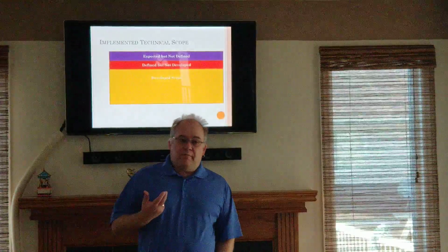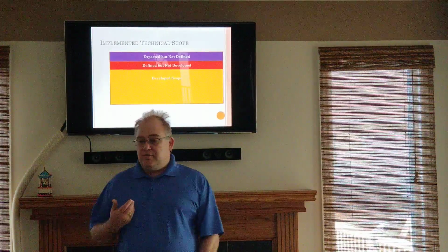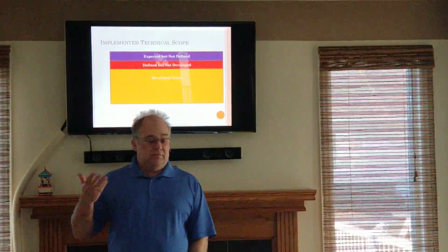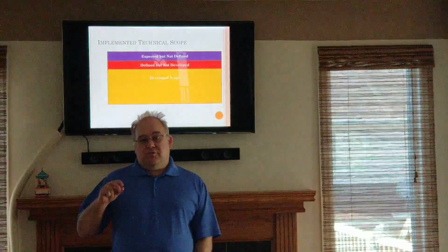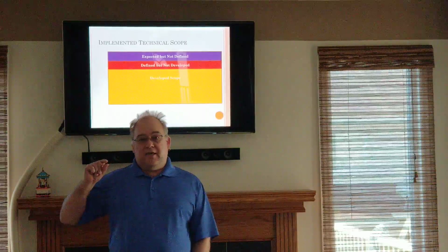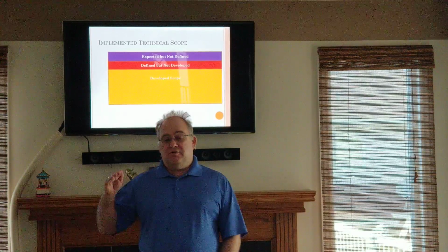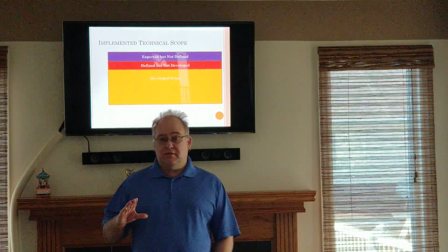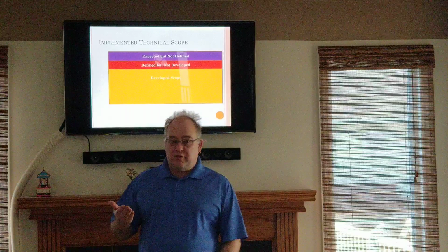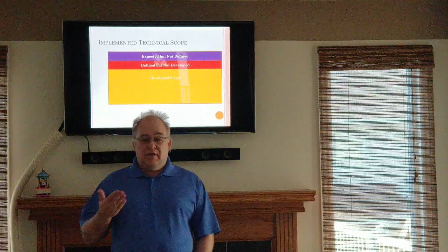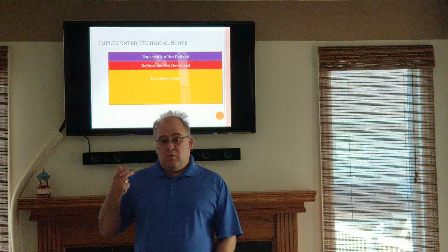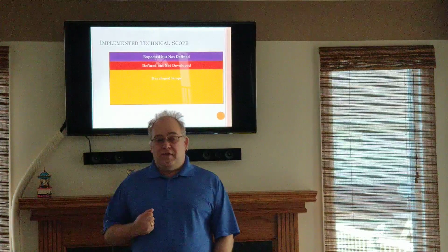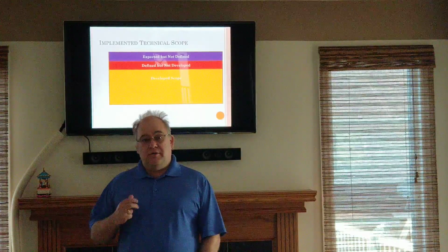From that defined capability, the team now progresses through and starts to implement in a variety of steps and manners. There is also quite typically some sort of disconnect between what has been defined in the contract and what actually gets implemented. And this usually comes down to ambiguity in those sets of requirements, in which case, again, there's a discrepancy between what the implementer reads and what the actual person drafting those requirements intended.